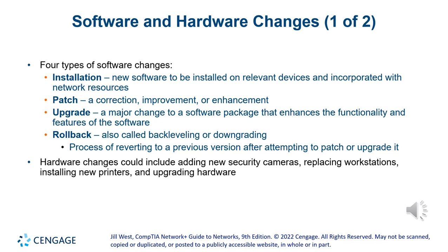So when you do the planning, change management has to include, say, hey, okay, I'm requesting that I do an upgrade on the router that's running 3.12, and I want to run the upgrade to 3.14. And this is the procedure to do the upgrade. If it fails, I need to roll back to 3.12. So these are my steps and my procedure to roll back and leave it the way it was, like if I didn't touch it.